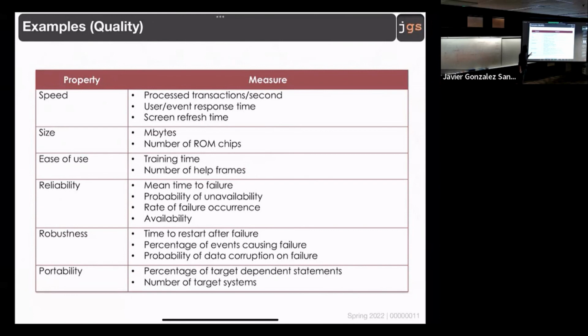So yes, if I tell you, the system should be fast, that's an adjective, therefore quality, therefore it seems to be non-functional. But before telling me that it is non-functional, you need to review the INVEST. And what happens with "should be fast" is you're going to identify a problem with testing. What am I going to do to test this? Negotiable. We don't understand the same about fast, the customer and myself. And you're going to identify problems.